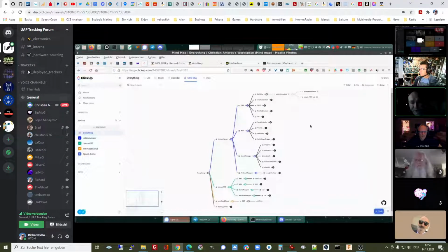Then we divide all those tasks into pieces that can be done within 40 to 60 minutes, because we are not professionals that are paid for. We are enthusiasts. We do not have, let's say, 10 hours per day to spend for this. If you do and you want to contribute in that way, go ahead. But the normal people in the normal life do not have that amount of time to spend for it. So 40 to 60 minutes, yes,